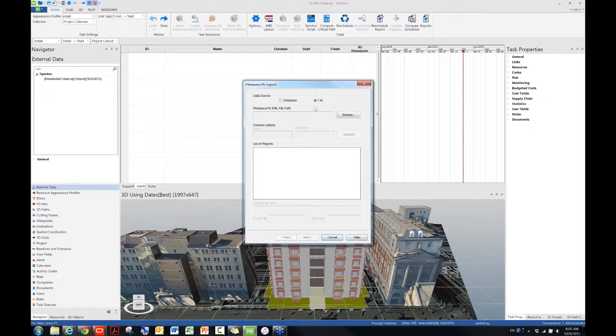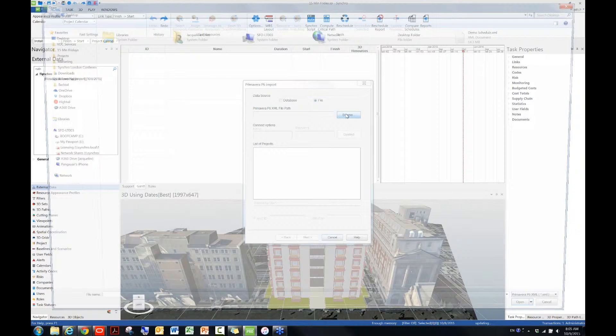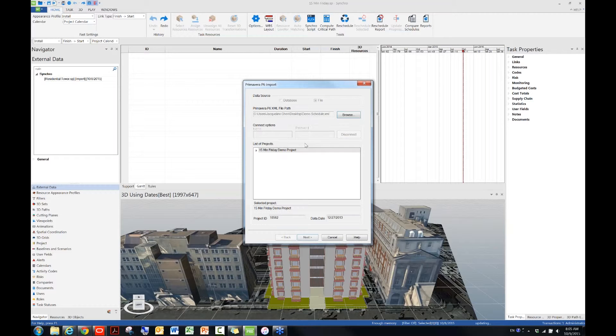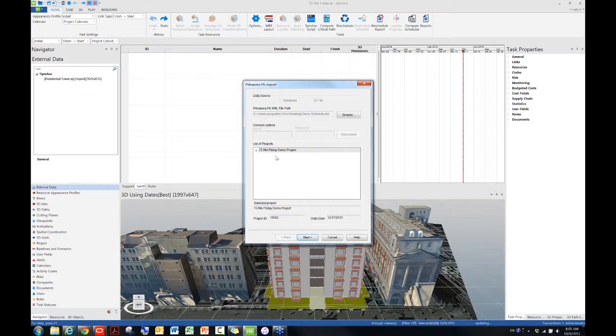Under Data Source, make sure you choose this file, because we're going to bring in a P6 XML file. Click on Browse to the location of the file. Double-click to open it, and then now you will see underneath the list of projects, the name of the project has popped up. And then simply you will just need to click on Next.